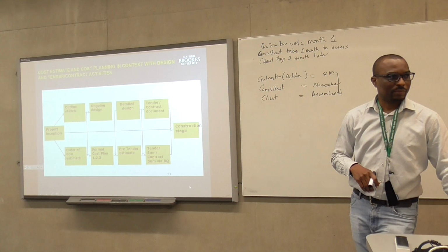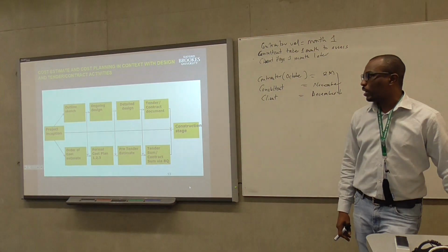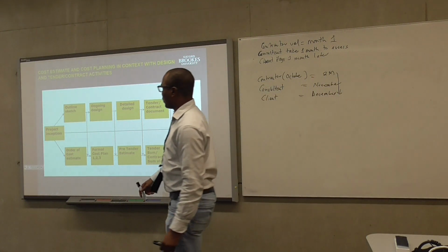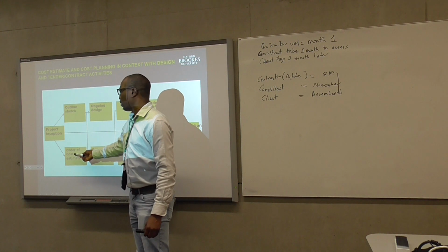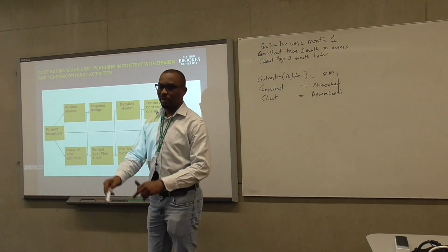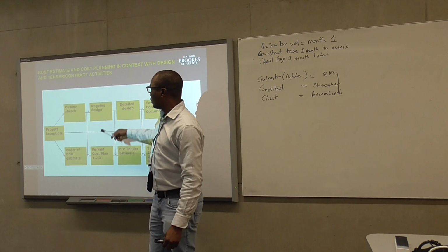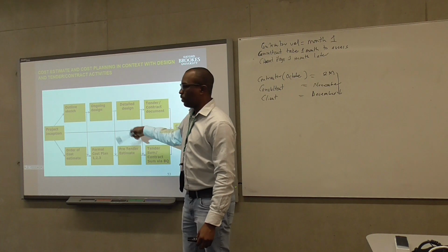So this is basically the cost process. When you go by the RIBA plan of work, there are various costs. If you have your sketch outline, you normally come up with the order of cost estimate, which makes use of the floor area or elemental or functional methods. As the design progresses, you come up with a formal cost plan.